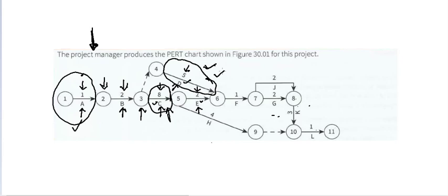Okay, but what we should realize here is that we had a total time of about 8 weeks here and 2 weeks here, 10 weeks, and we only required 5 weeks for module testing, which basically means we had lots of spare time, right?